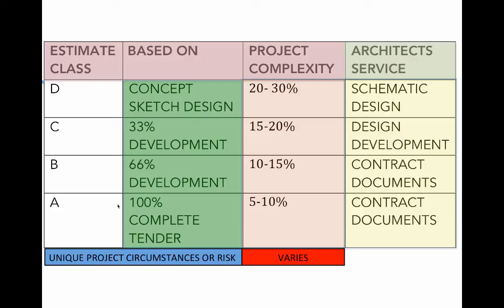Often clients think that the materials and finishes are the ones to cut. Whenever your job's over budget, oftentimes you come back and strip this, strip that. So woods are taken out or stone is taken out and drywall appears everywhere. It always seems to be materials. But oftentimes your best advice to a client is to say you have to reduce area, because that's where you get the full benefit of cost savings. You're reducing mechanical, you're reducing electrical, you're reducing everything throughout the project, and so that's your best way of actually bringing it down.